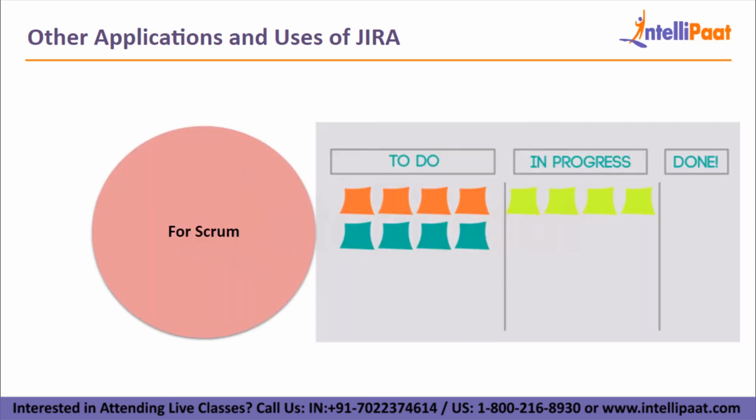Next, we'll talk about Scrum. Jira even assists the user in generating project Scrum boards. The Scrum boards assist the person in keeping track of sprints and backlogs so that the project can be completed more quickly. Jira Scrum board is ideal for large projects because it streamlines the entire project process. Putting up a new Scrum board for the project follows the same steps as setting up a Kanban board. The person can pick up items from the backlogs and place them in the sprints separately. Furthermore, Jira converts these sprints into little Kanban boards so that the project can be easily managed and there is no chaos when working on it.